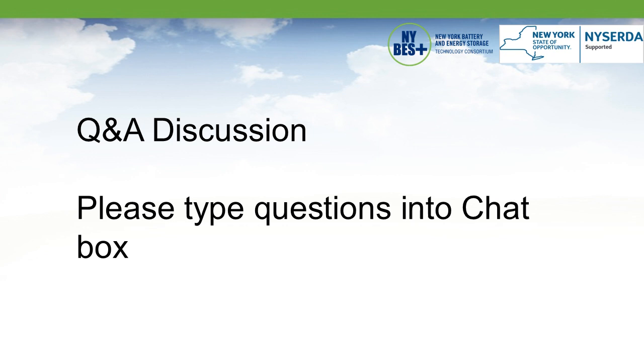Very good. And to follow up, another set of questions is about people thinking about solar and storage together or solar standalone, the idea of a hybrid system versus a standalone system. If it's an existing PV project looking to add energy storage, there should be either an application already in or the project completed. That would stand by itself, and the addition of energy storage would have a whole separate application, and the utilities would combine them as they go through their process and do a study based on both.